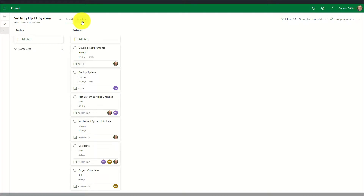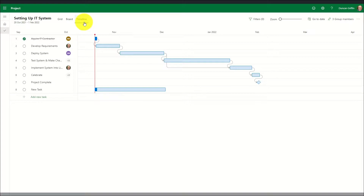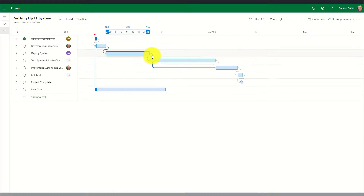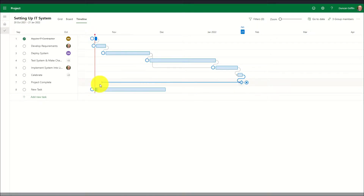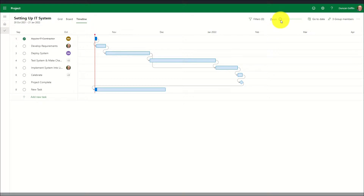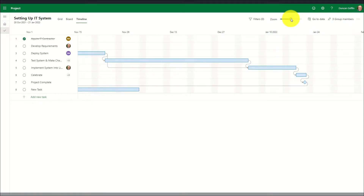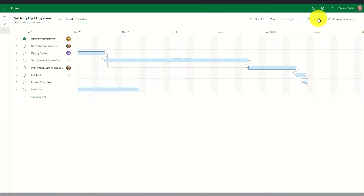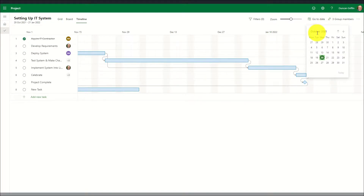The third viewing option is to view tasks in a timeline view, where an interactive Gantt will appear on screen allowing modifications to tasks by clicking on the task bar and moving the sliders to shorten the start date or finish date. Dependencies can also be set by clicking on the circle at the end of the task bar and dragging it to the required task. The zoom bar can be used to scale the Gantt view, and the go-to-date function moves the Gantt chart to a specific date to view tasks within that time period.